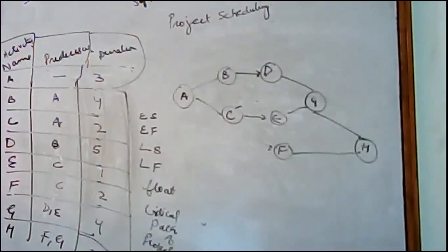The diagram is something like this. Just see, A, B, C, D are in parallel, and after that there is F, E, and from F and E we are moving towards G. Is that clear to everybody? Can you see on the screen? And here is a duration also. A has 2, B has 2, F has 3 duration, C has 1, D has 3, E has 1, G has 2. Is your diagram like this?